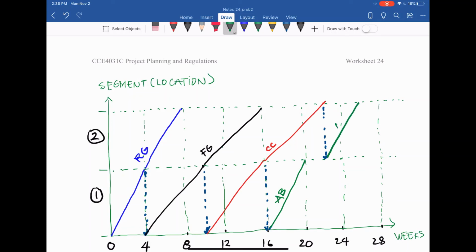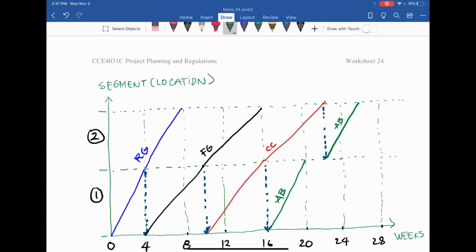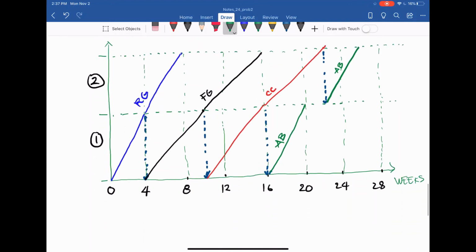So that is aggregate base, and that can be considered discontinuous. We finish aggregate base for segment 1 at week 20, and then we stop and wait for 2 weeks. At 22, we can continue aggregate base, and that allows discontinuous work for one crew. If you want continuous work, so that someone on site keeps doing it, then you can do the aggregate base for segment 1 go down, in 2 weeks and 4 weeks.